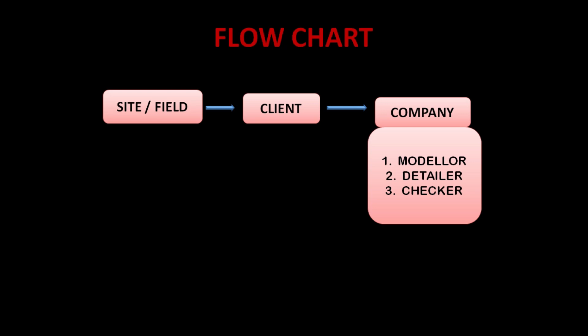After detailing, the drawings are sent to the checker. The checker verifies whether the modeler and detailer have given proper dimensions and used proper materials. If there is anything wrong in the model, the checker sends it back to the modeler for corrections. If there is anything wrong in the detailing, the checker sends the detailing drawings back to the detailer for corrections.